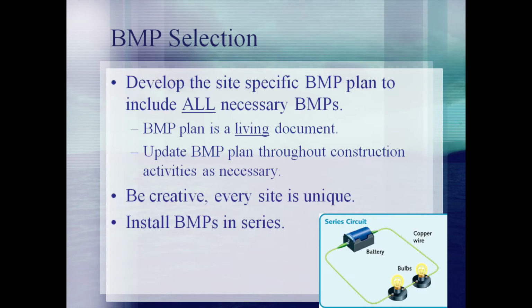Every construction project on the airport must implement some type of BMP in order to control potential pollutants generated by the activity. These BMPs must be documented in a site plan that includes a site map. Note that BMPs may be updated at any time during the construction as long as the changes are noted in the plans and initialed by the contractor. The selected BMPs must be installed prior to any construction work on the site, including demolition. Once installed, the BMPs must be maintained throughout the course of the work until the soil has been stabilized.